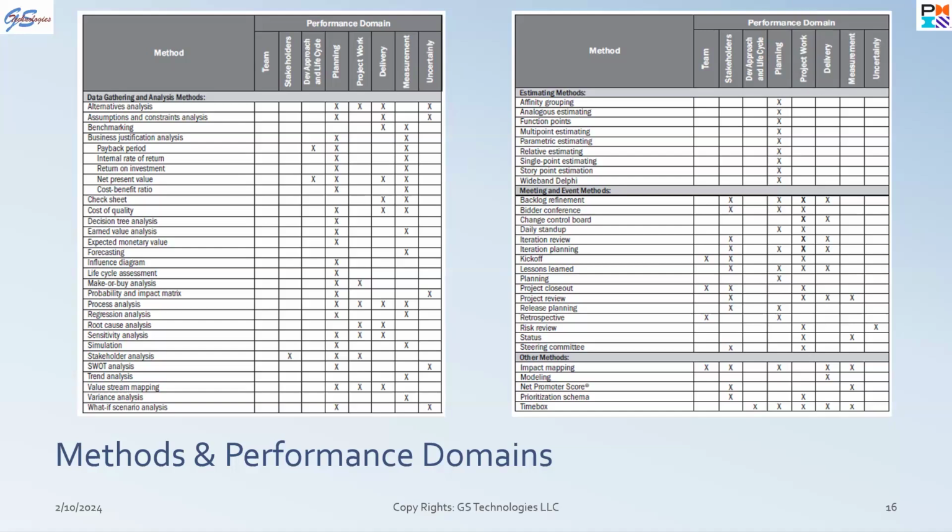I can try. When estimating proposals for lump sum contracts, we probably want to do a ground up estimate, where we know everything and estimate every piece. But if we are doing a study where we don't know where it's going to go, we go with time and material contracts. So we do time frame estimates, how much support we think we're going to provide in a period of time. Very good example. Anybody else?